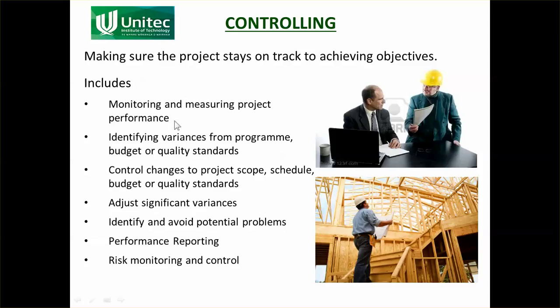But you're also looking at time. Are we bringing this on time? Cost, are we bringing it in on the budget that we've got? Are there any changes that have happened? Has the client added more work? If so, we need to be paid more and we need more time to do it. So variances, we're identifying those and we are processing them. And we're also looking at that data that we collected on site about how long it's taking us to do work and how much it's costing, and we're saying, is this what we thought it would be?